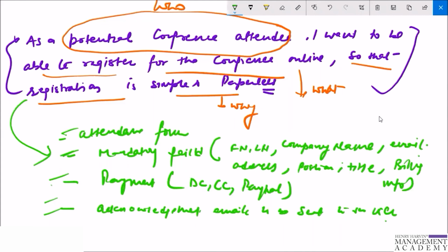And why we need not cover the code review, non-blocker issues, performance testing, is because your acceptance criteria should not include any of the above, because your team should already have a clear understanding of what the definition of done includes. For instance, you say that the code review is done, testing is done, development is done, the product owner has reviewed the stories, it is releasable, it should be deployed on the demo server and all those things.